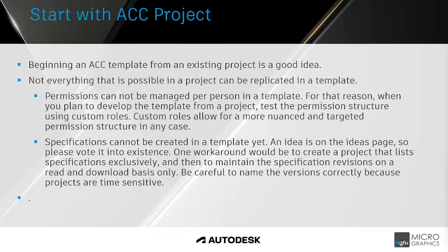So starting off with the project, beginning an ACC template from an existing project is a good idea. That is in my experience. Not everything that is possible in a project can be replicated in a template, so you have to have some foreknowledge of how the template is going to behave. That you will get experience with watching a webinar like this one, or reading up on it, or just from experience. Permissions cannot be managed per person in a template. That is a very important thing. So many of us, when we start working with Autodesk Construction Cloud, would use individuals to manage permissions with, and that can be troublesome.